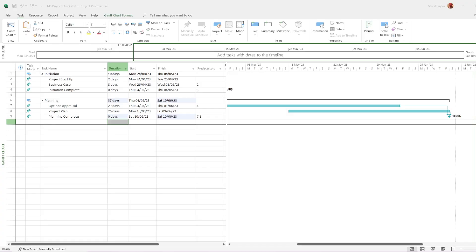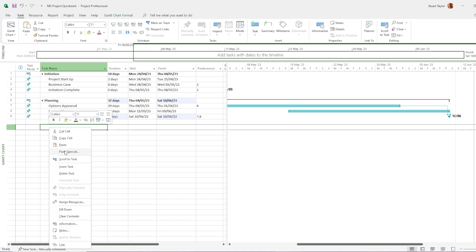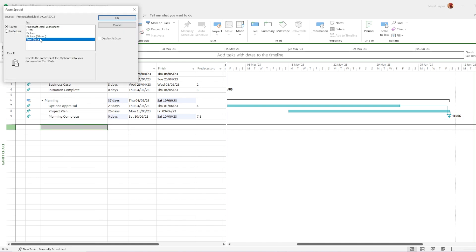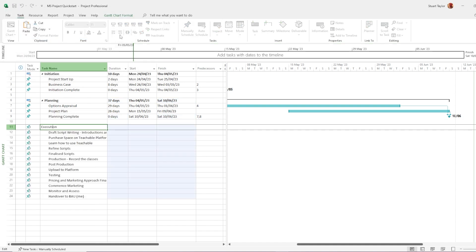Manual scheduling puts the control back into your hands. Tasks won't shift around unless you explicitly decide to move them. This can be helpful when you're in the early steps of planning and you're trying to figure out the details without tasks moving around by themselves. It's also helpful if you're preparing to present a schedule and you just want everything to stay where you put it.